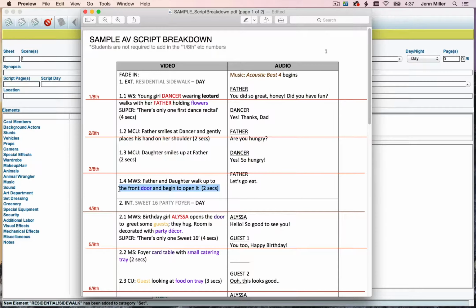So it could go either way. You could choose to round it up if you think it's closer to 4/8, or it's really right in the middle, so I could round it down. Now I'm going to consider the content that I have in this scene. I don't have any stunts, I don't have any special effects, I don't have any really intense or emotional dialogue. It's minimal talent, so it's not a big group scene, so it's pretty basic in terms of scene content. So for that reason, I'm going to choose to round down, and I'm going to estimate the length of the